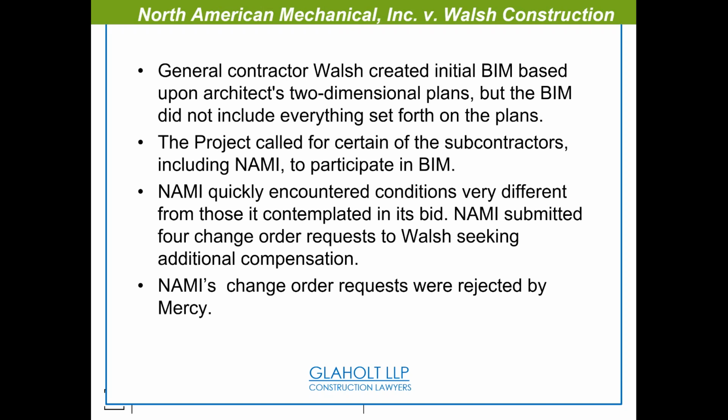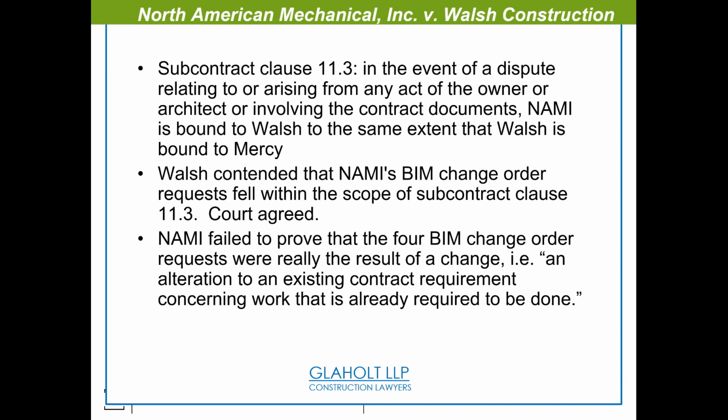Another quick example here. This is one of the BIM litigations that came up, and it's typical. The contractor created an initial BIM based on the plans. The BIM didn't include everything that was in the plans. And then they wanted subcontractors to participate in BIM. And then once they started modeling, they encountered that the conditions were different from what was bid on, submitted a change order, and the change orders were rejected.